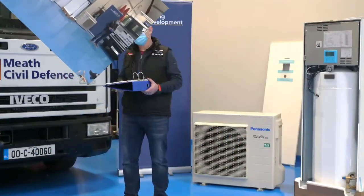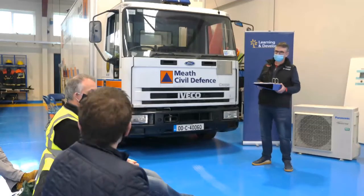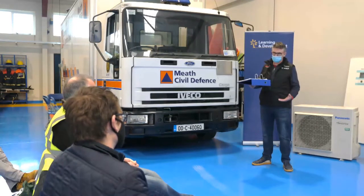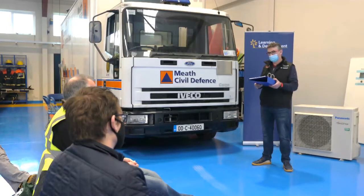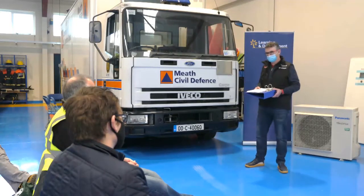Because then it's just not going to have its airflow. So if you're looking at a development at various stages of construction, and perhaps the unit hasn't arrived on site, they should make allowances for the plinth and for the drainage. Some of them have drip trays with the actual outlet to one side, and some in the middle. But if there's a gully there at all, you can work to it, right? And the plinth is dished. If you call out, they should be making arrangements for their ducts, how they're getting into the property. The ducts should be in place from an early stage.